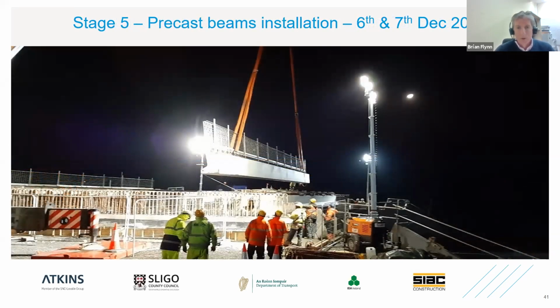So the beams could only be dropped in during a possession, and as we mentioned earlier on, the possessions were generally from 10:30 at night until 5 in the morning. So SIAC successfully installed all 24 beams over 2 nights, the 6th and 7th of December 2019. And all I can say is SIAC and their subcontractors, Javelin Formwork, deserve great credit. The installation process was managed with absolute precision.